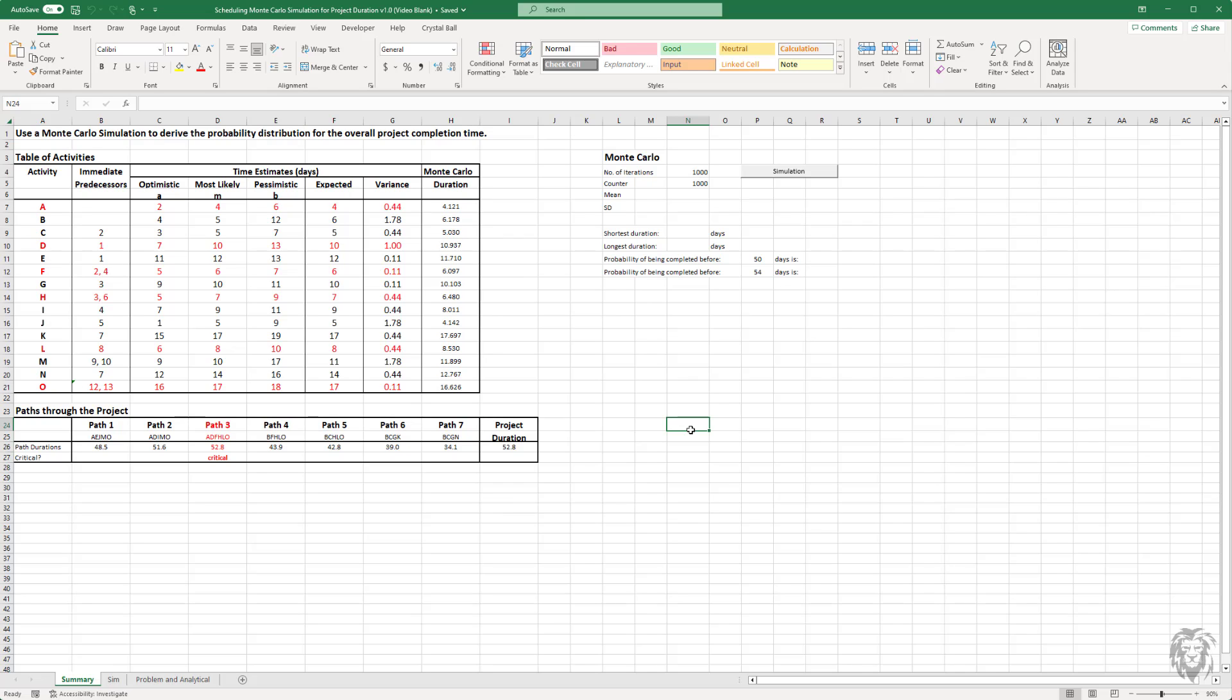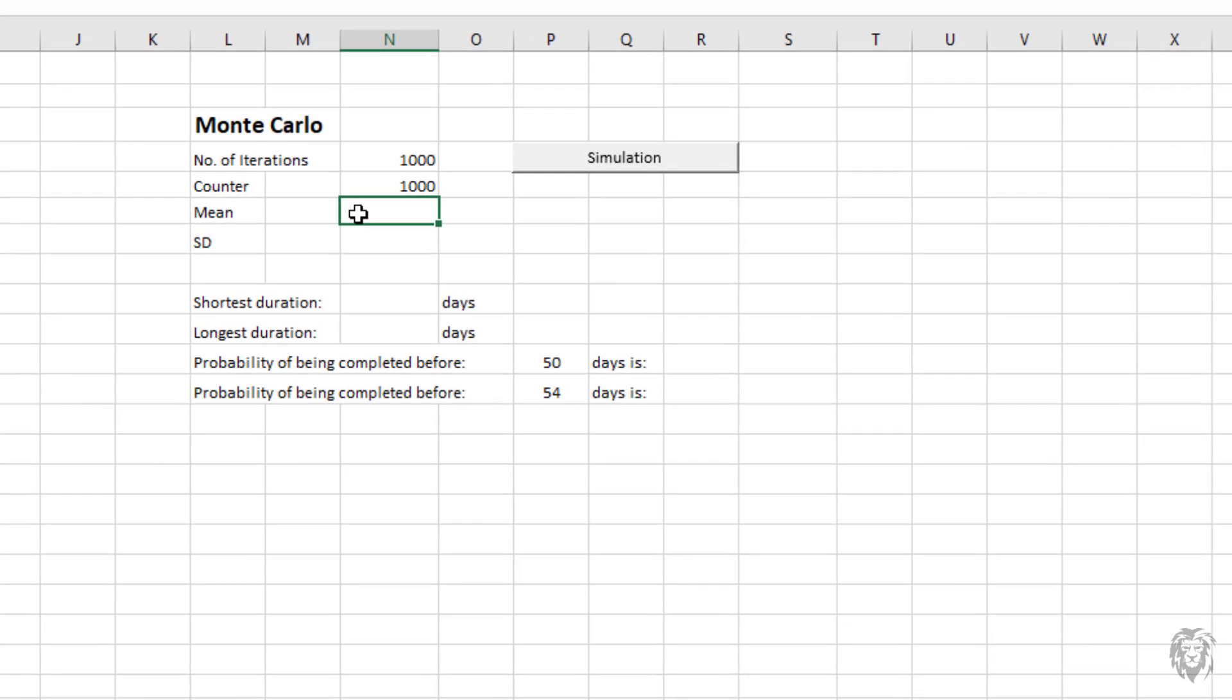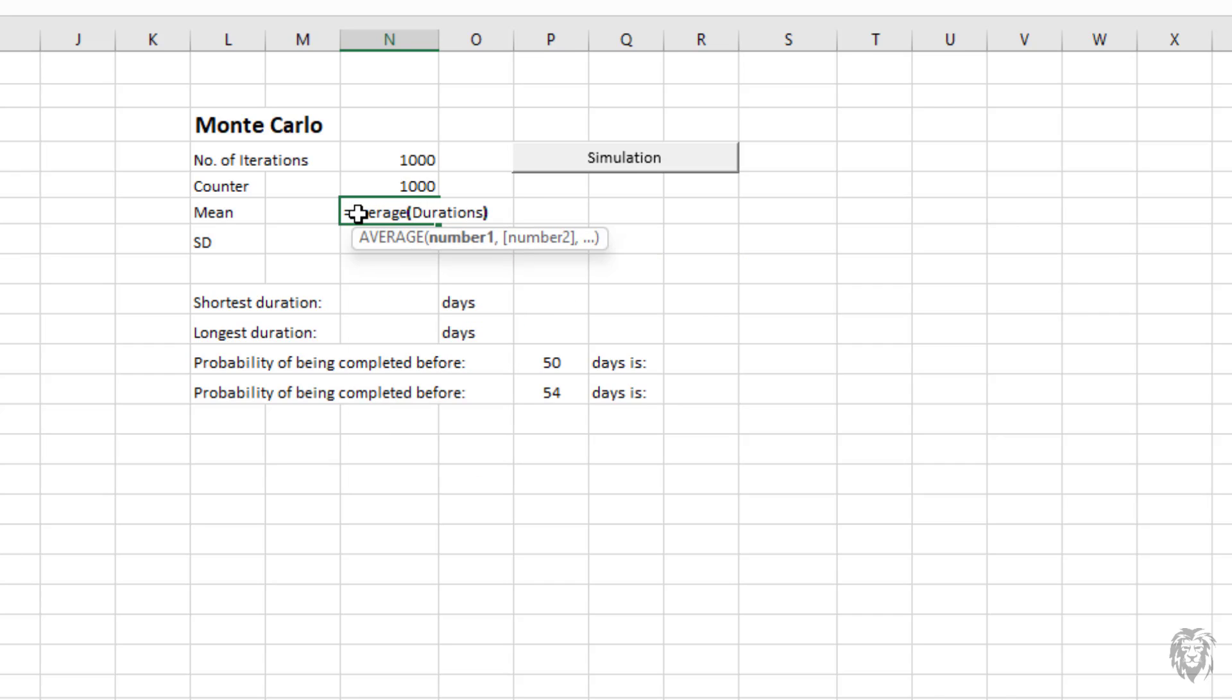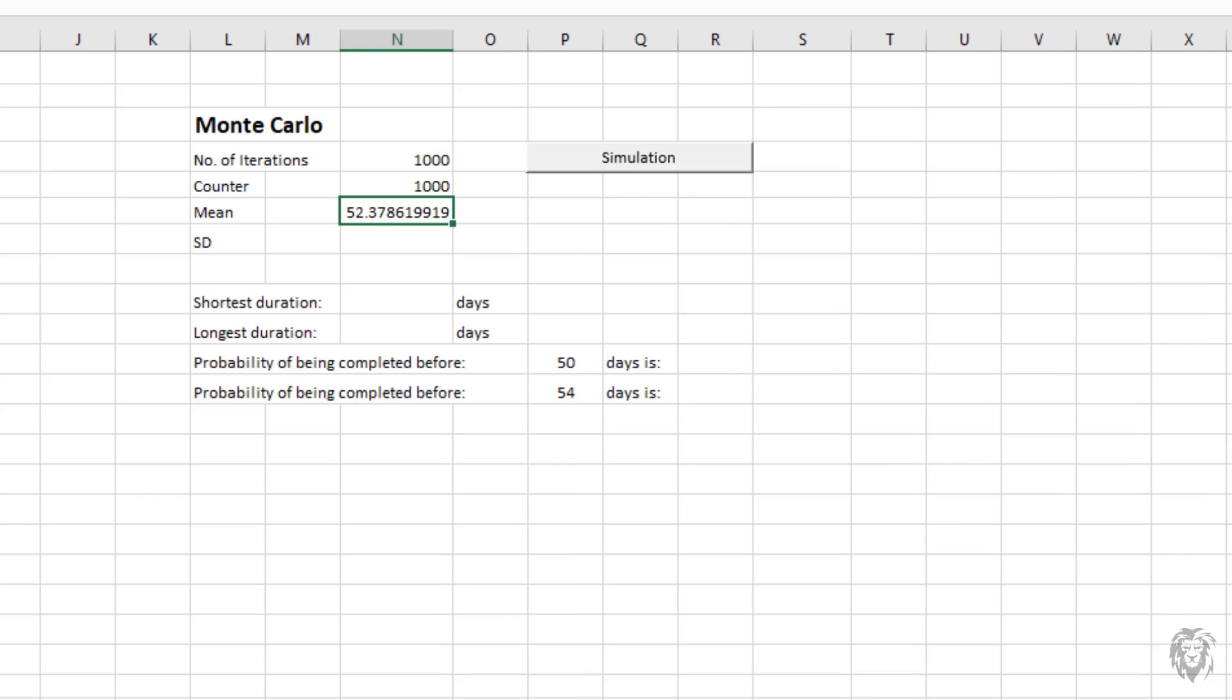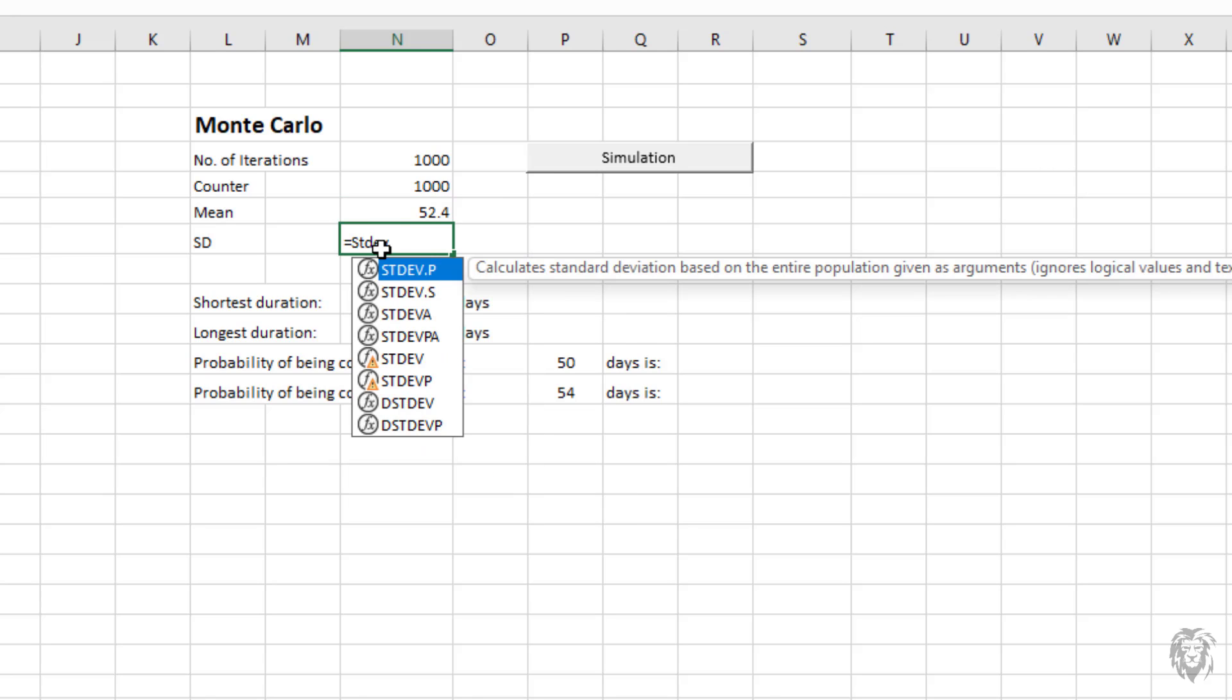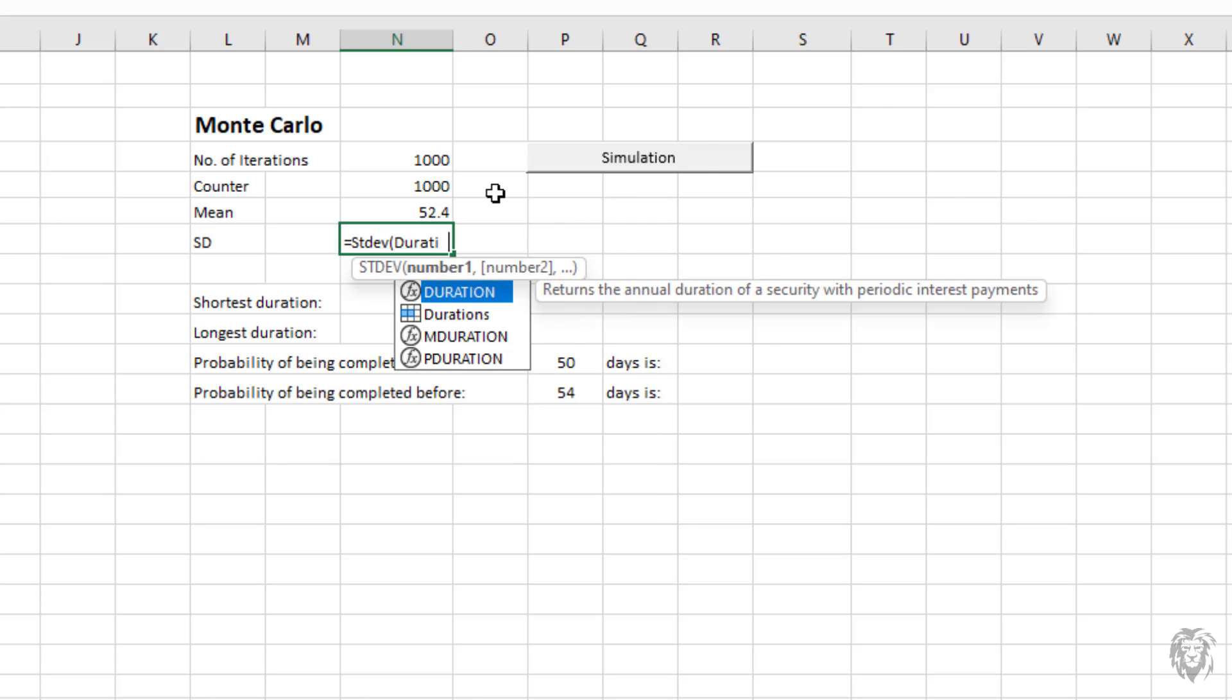So let's keep working on this. Let's make it a little bit better. We're obviously having some fun. I don't know if you noticed when we ran the simulation, you're actually seeing as it's going through how the critical path is not always path three, normally path three, sometimes path two, and then very rarely it actually comes out as path one. So we're seeing that convergence bias being accommodated. So now, because remember we, in our macro, we assigned the name domain durations, we can actually use that just to get some statistics. So we can come up with our average of durations that should go in there. We can format it down so that we have, and set our standard deviation, and again, durations.